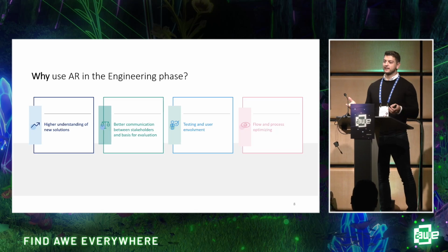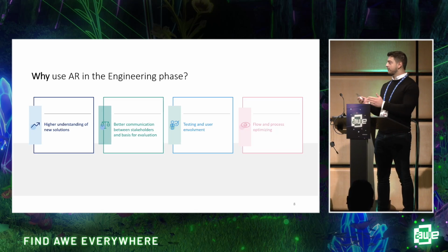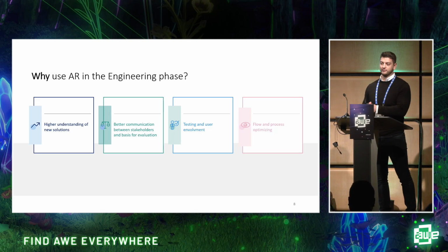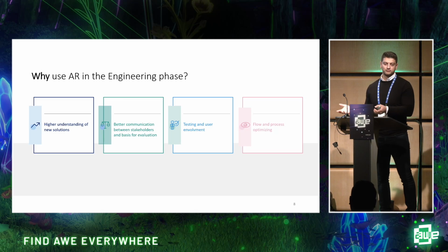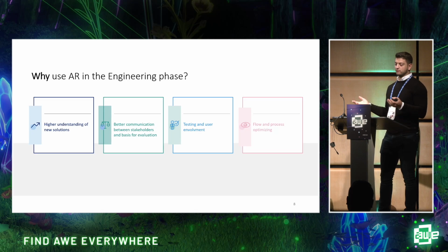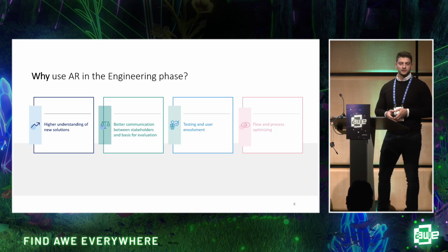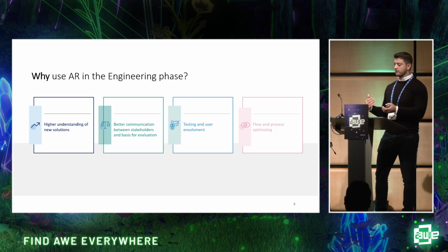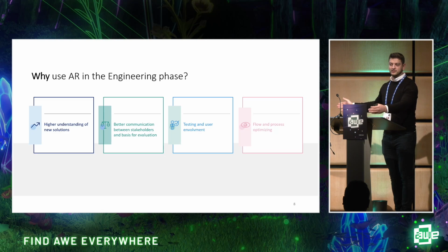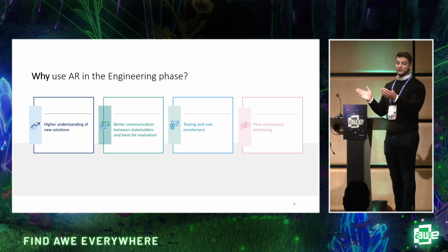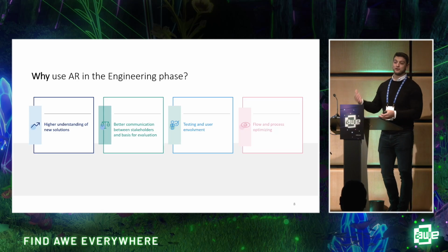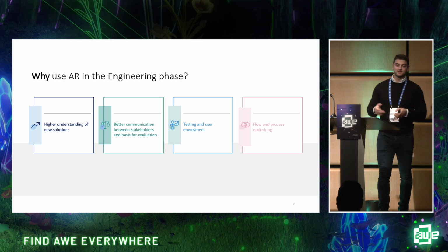It sounds ridiculous, but the reason it happens is because you have some project managers working with no experience in how to test the solutions. And the way I've seen some projects go wrong is that you think you need space from the wall to the production line to fit a pallet, but you simply forget the palletizer that takes more space and the human behind the palletizer that even takes some space.